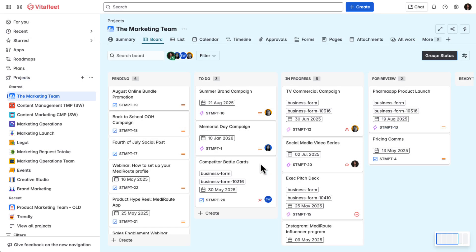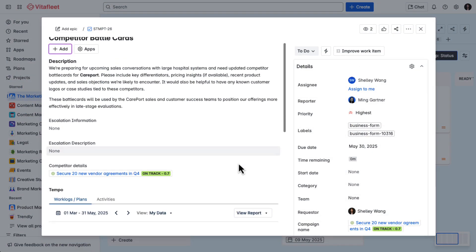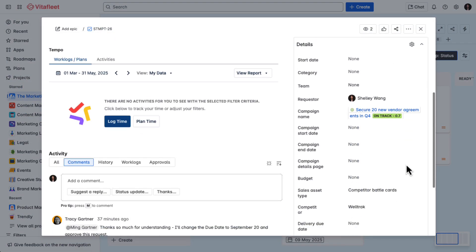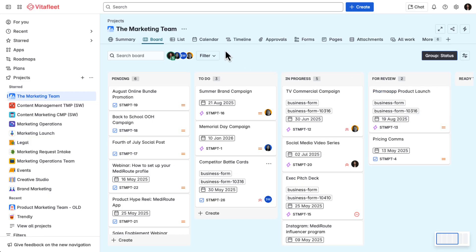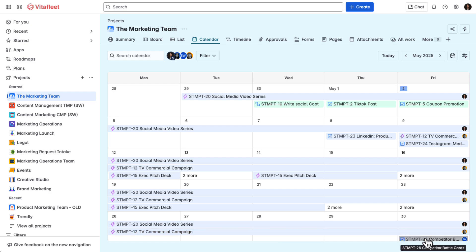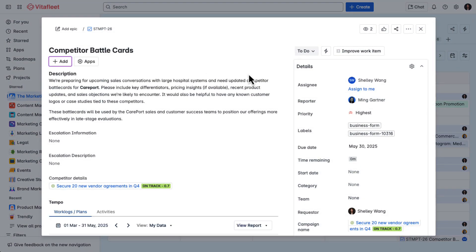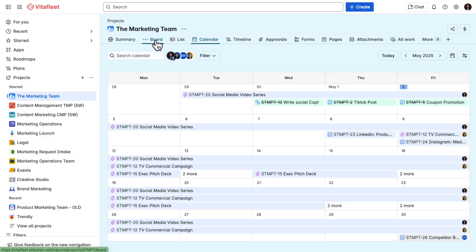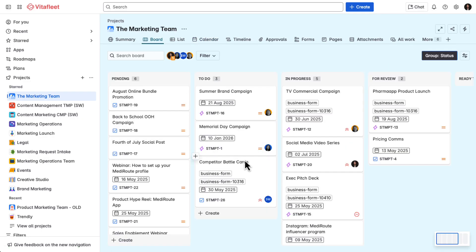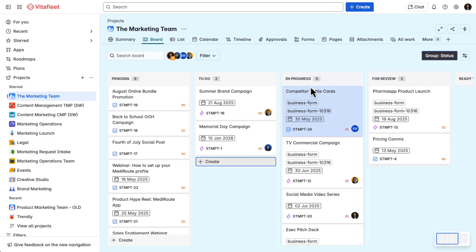Shelly, that's me, gets assigned to the task and receives a notification. I open up the work item, review the details, and check the due date on our shared calendar. Once I've scoped out the requirements for the battle cards, I move the task to in-progress. Ming can see the status change and knows everything is on track.